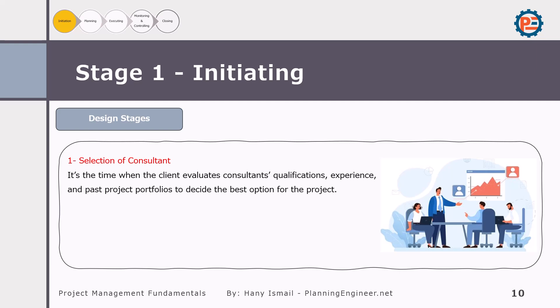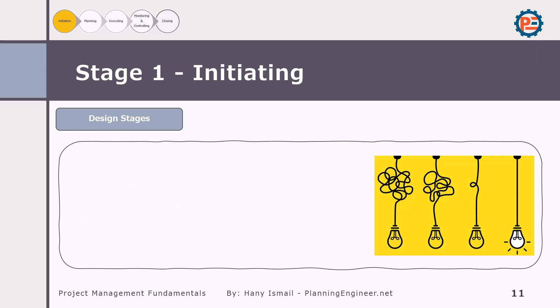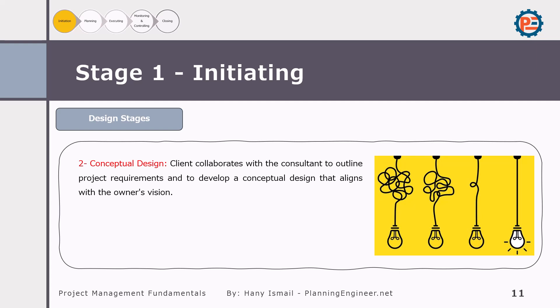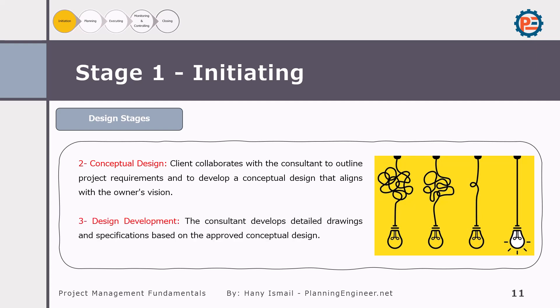Once a consultant is selected, the next step is to create a conceptual design. As a client, have meetings with the consultant and make sure they clearly understand your needs. The client collaborates with the consultant to outline project requirements and develop a conceptual design that aligns with the owner's vision. The conceptual design covers the headlines: how many stories, what materials will be used, what is the built-up area — this ensures design development goes smoothly.